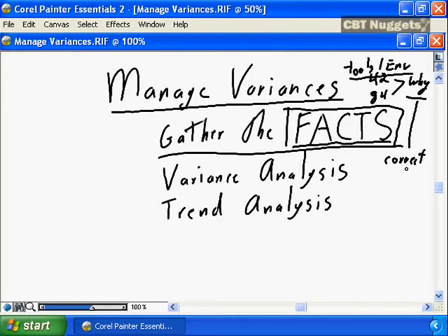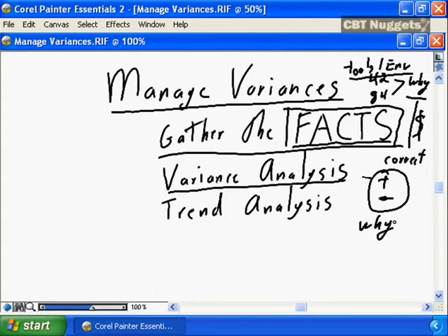Going forward, we are now 42 hours over on our budget, which means we're 42 hours worth of labor over on our budget. That leads us into the variance analysis. What are the pluses? What are the minuses? How often do we need to review? How often do we need to work with the project team members to do the proper variance analysis, to again understand why, effectively doing a root cause analysis, and to understand what can be done to improve the project delivery scenario.